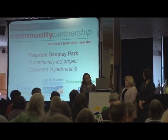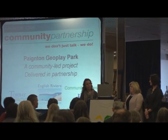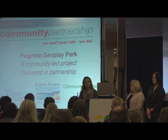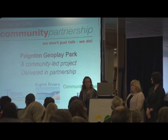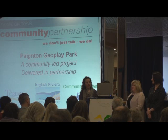Our location, some of you will know, became quite a sensitive issue. Because we wanted something towards the seafront area, we had to do quite a lot of formal consultation. We were only able to deliver that through working with a lot of the volunteers in the community partnerships, who over a 6-month period engaged with over 3,000 people and asked them their opinions of where this facility should be. We had a formal consultation which generated around 2,000 responses, and there was also a series of Facebook activities where 3,500 residents engaged as well.